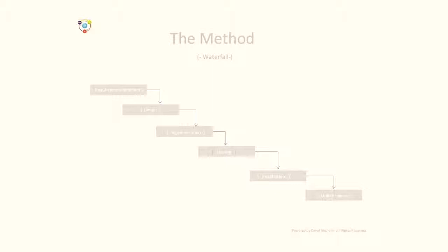This is quite a method. But what's wrong with this method? As you can see on the scheme, you never go back. Once the requirements definition is done, it goes directly to the next step, design, and then directly to the next step, implementation. So this method can't be used for all projects, because you've got to be sure of what you're doing and how you will be doing it, which is not always possible at the beginning of the project.